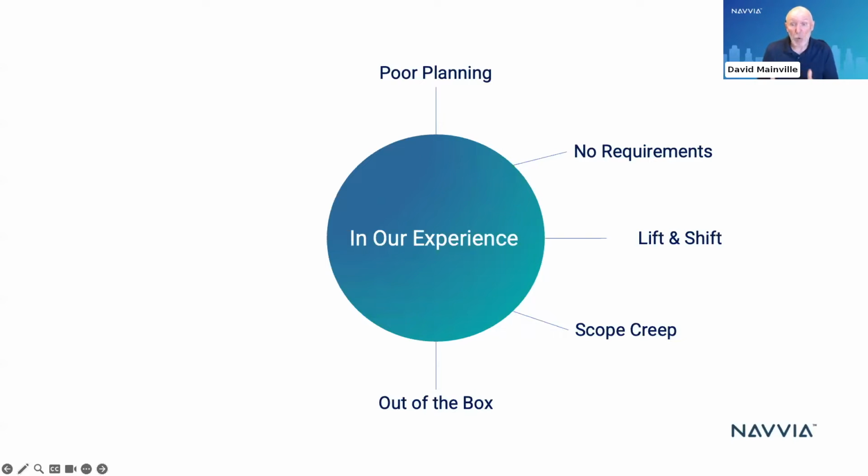They spent one day trying to understand the requirements for a global organization and really were shoving this out of the box approach. There are so many things in organizations with legacy systems, with just the way information is communicated from one division to another. Unless you understand that, you're going to end up with a new tool implementation that has a lot of gaps in it. So out of the box can be a problem in our experience for a poor ITSM tool implementation.